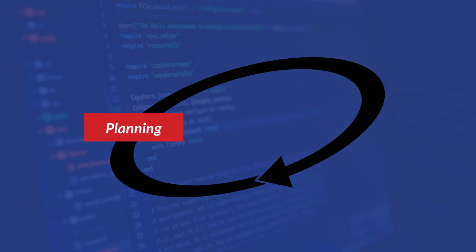First is planning. This stage is where the UX magic happens. Rather than a lengthy requirements document, the customer writes user stories which define the functionality the customer would like to see, along with the business value and priority of each of those features. User stories don't need to be exhaustive or overly technical. They only need to provide enough detail to help the team determine how long it will take to implement those features.